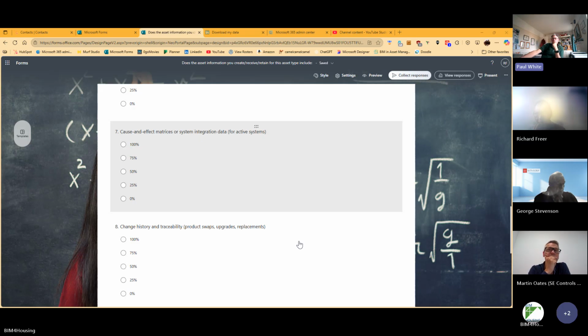But we're working on revising 7346 Part 8 at the moment, and I've been drafting quite a lot of that. I'm looking for a design document to be handed over that includes all of this stuff. Good. Right, okay. So that when another third party turns up to inspect it in the future, they can see what conclusions you drew and how your design is the basis of your design, and what your cause and effect is. Because if you don't have that available,